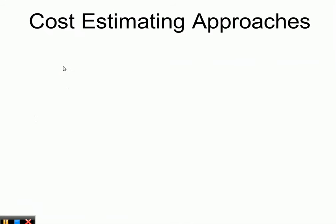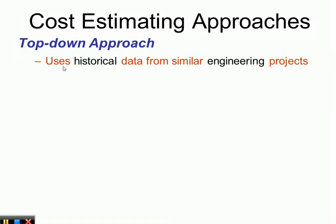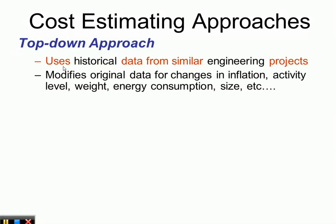There are two basic cost estimating approaches. The top-down approach uses historical data from similar engineering projects and modifies original data for changes in inflation, activity level, weight, energy consumption, size, and other factors. It is best used early in the estimating process.